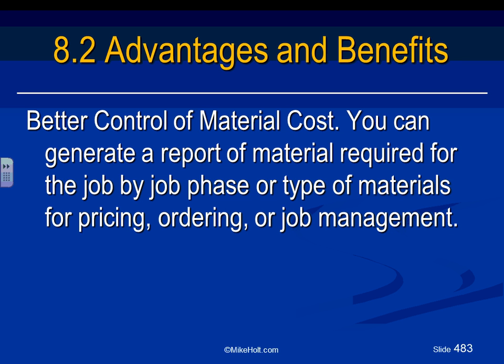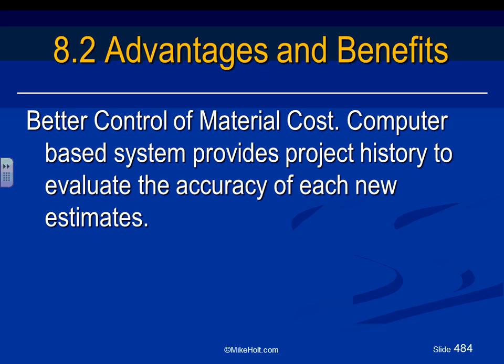Aaron, my friend, you guys were slicing it even deeper than I asked you to do. That will allow you to allocate all the EMT conduit that you need for every phase, even for every system if you want. So who cares? That will allow you to manage the project much better. Bring the material whenever you need it to the job.